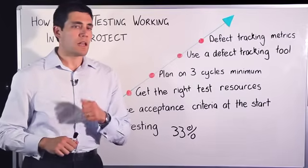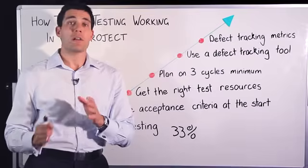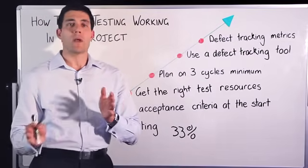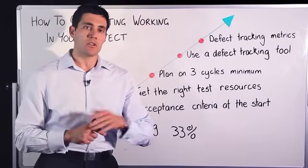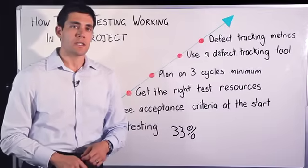Make sure you get the right resources. If your project can afford it, get a test manager assigned to you. Initially, they'll have a lot of activities to do at the start of the project. Down the road, they can just direct the testers in doing an execution of the test scripts. Definitely make sure you get the right test resources on your project team.